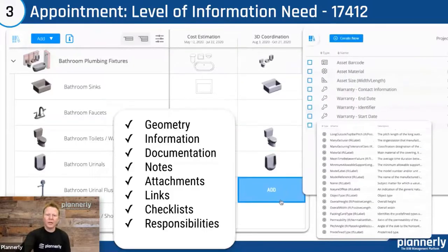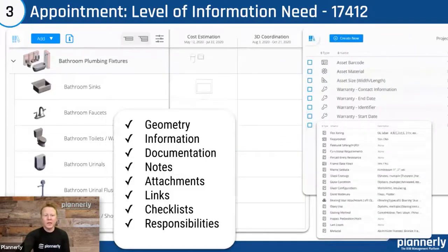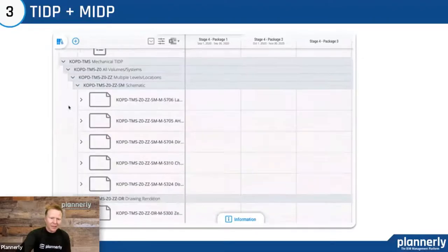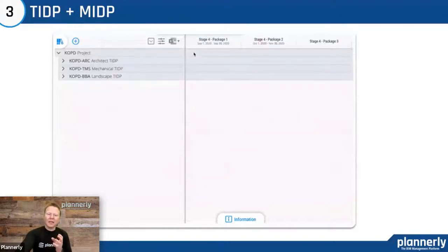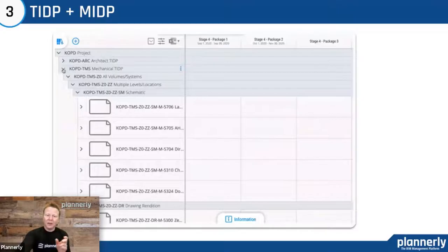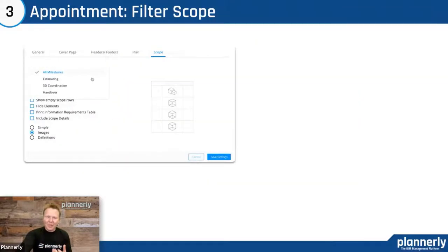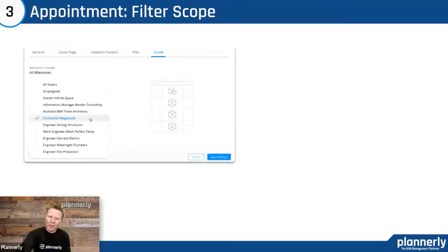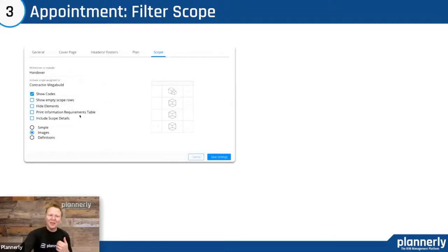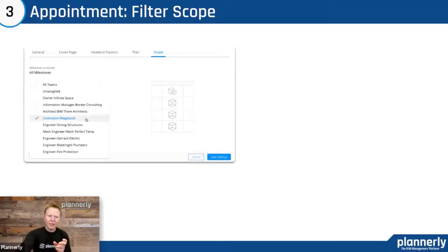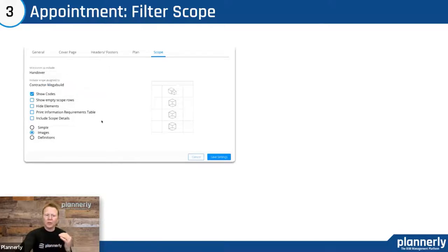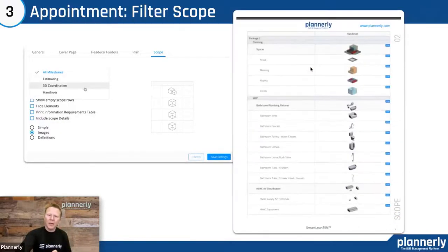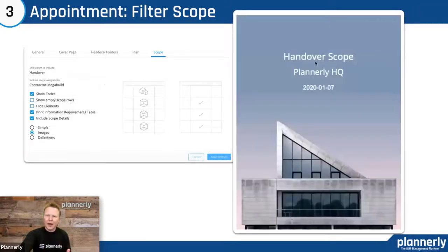The new ISO 17412 is a really powerful way of being very much more prescriptive about what you're asking for so that you can then check it later on. And then the task list — having task information delivery plans here, we can see the three from the architect, the mechanical engineer, and the landscape team — all summarized, understanding what they're delivering, when they're delivering it, and how it's going to be classified and coded. A great way of asking in this regard is to filter specifically per appointment — choosing milestones, an information delivery milestone or purpose, and also a team. These PDFs form the contract — the appointment documents — and are much more targeted for each of those appointments.